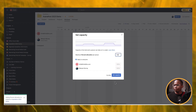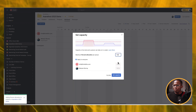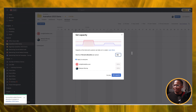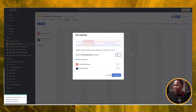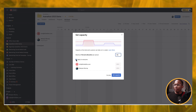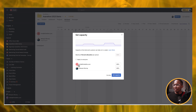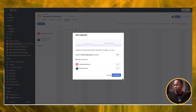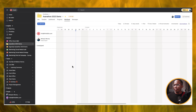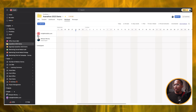By popular demand, Asana has added the new percentage allocation feature. Once I go next at the portfolio level, it's going to ask me to add those fields to my projects. I'll add that effort right there. Let's assume we want everyone working at 80% of the time. Like we do for estimated hours, we can change that for individuals. So let's go and set that capacity across the board. As you can see there's no information yet — we're going to have to go and give it some information.